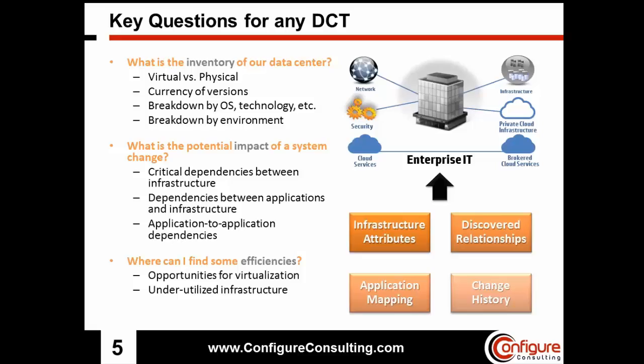Some of these questions really do have make or break impacts on a data center transformation. Take currency versions, for example. Failure to identify and plan around out-of-date or out-of-support systems can significantly delay, or could have a show-stopping effect on, the game plan for a transformation.